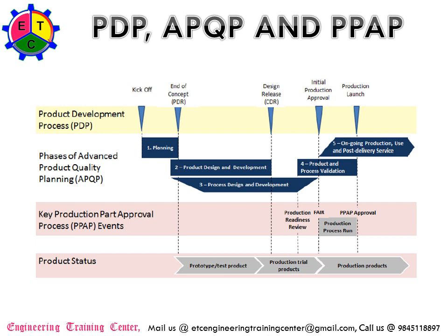preliminary design review phase. That means all the APQP gets aligned from kickoff to PDR, which becomes the planning phase, and then from PDR to CDR, that is preliminary design review to design release or critical design review, that becomes the product design and development phase. That's where the major engineering activities come into the picture.